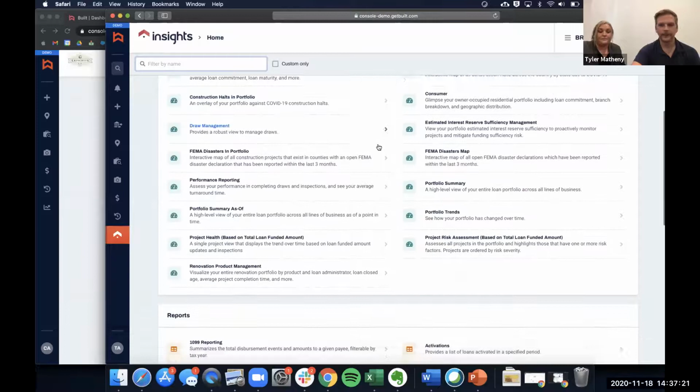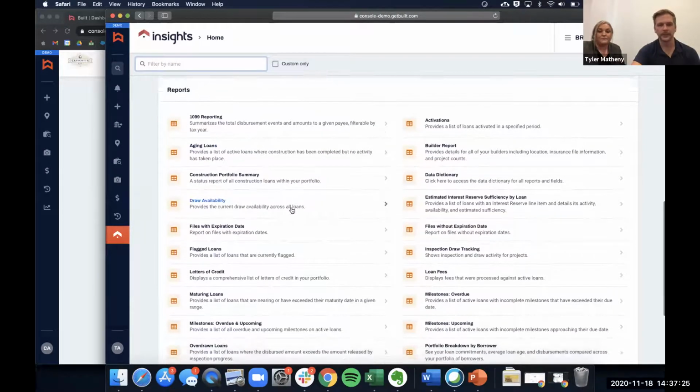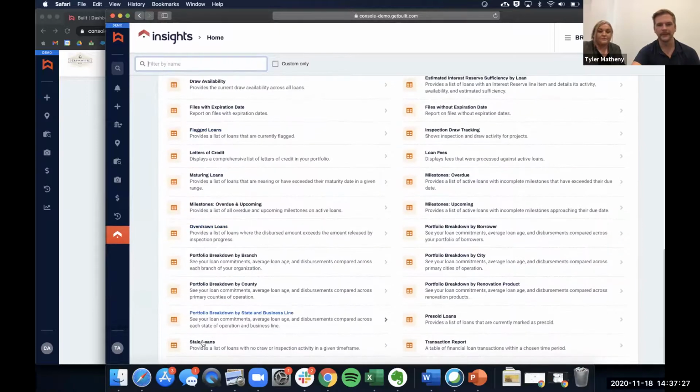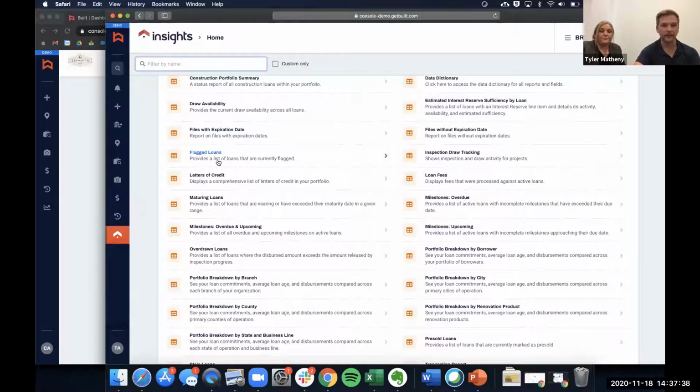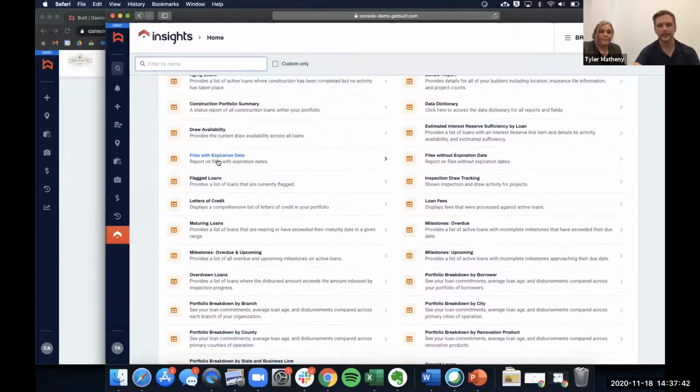And so, even things like Natalie mentioned, stale loans, there's a ton of reports that key off of: have we not had any draws or inspections in the last X amount of time? How many projects do we have that are over budget? Let me see all of the loans that are flagged for any reason. Really just ways to get to this data immediately.